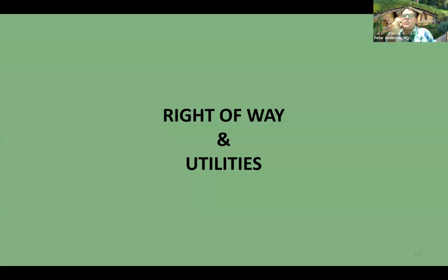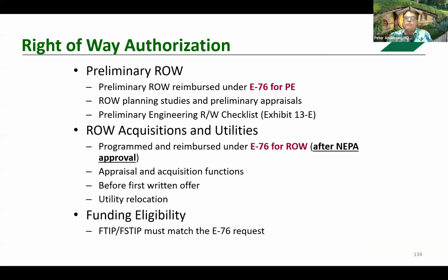Another area we're going to just touch upon is right-of-way. Federal Aid Series also includes a separate right-of-way course. So this was kind of a question that was asked earlier about preliminary right-of-way activities that may be considered eligible and authorized as part of the PE. They include pre-acquisition activities such as estimating, title searches, preliminary property map preparation and studies. These are all needed as part of NEPA.